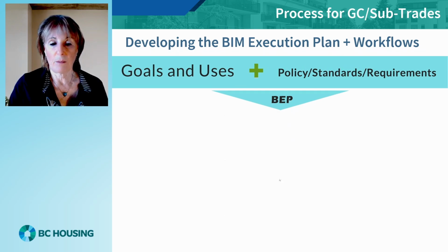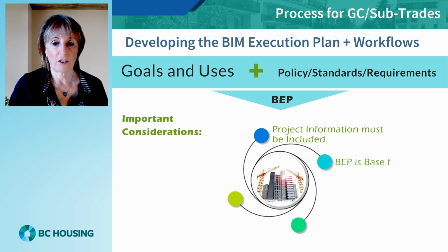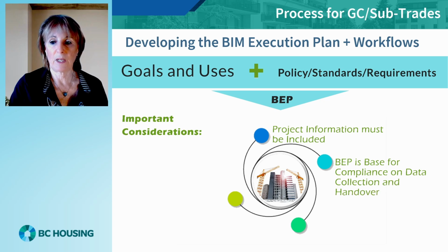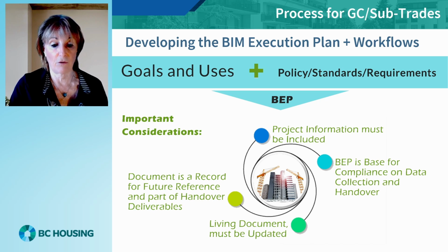Some things to keep in mind. Don't forget to include the base project information. Compliance checks, audits for data and document collection as a handover deliverable will be using the BEP as the basis for compliance. The BEP is a dynamic document that will change as the project proceeds. It's important that it is regularly updated for future reference. And don't forget, the BEP forms part of the handover deliverable.